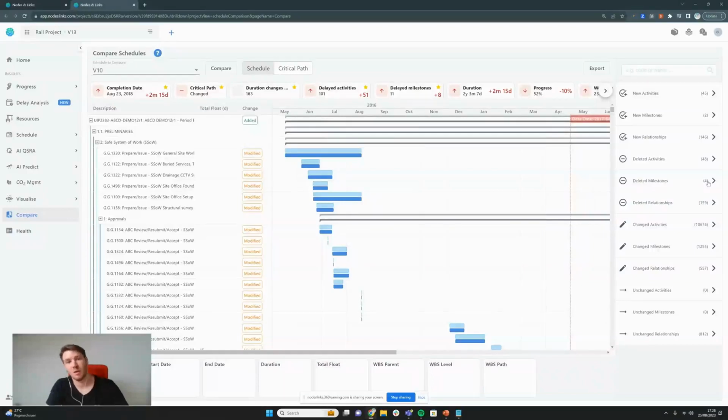Now I know this program has about 1,500 activities. So with an addition, let's say of around 50 for ease of math, and a removal of around 50, I can get a general ratio of how scope is changing between these two programs. So it would be 50 divided by 1,500 is the addition, and the same with the removal. And from that, we can start to understand how the quality of our program in terms of scope change might drive in the future.